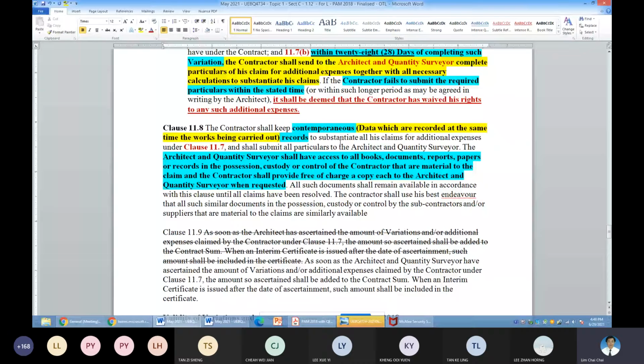Let's say your work is July, because there's a possibility you may purchase earlier by 1 month or so. And then at the end of the day, to collect it from the supplier 1 month or so. It cannot be 1 year later, then only, oh, this document to be supported for my claim, where the date shown is 1 year away. Now, this is not contemporaneous. It's very fishy. The information is very, very fishy.